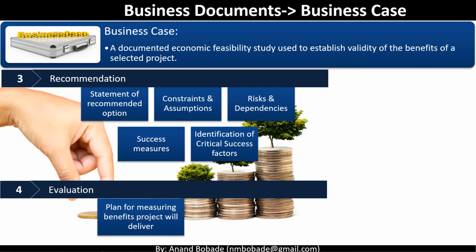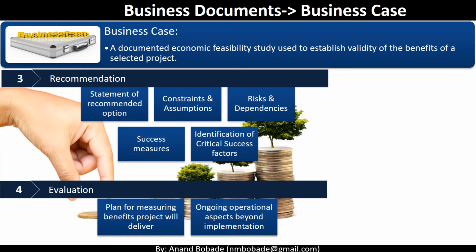So a plan for measuring the benefit the project will deliver, and ongoing operational aspects which are beyond the implementation of the project, mostly to deal with how you are going to manage this product outcome throughout the life cycle. The business case is a live document and can be updated throughout the project life cycle. An update to the business case will always impact the project or project management plan.